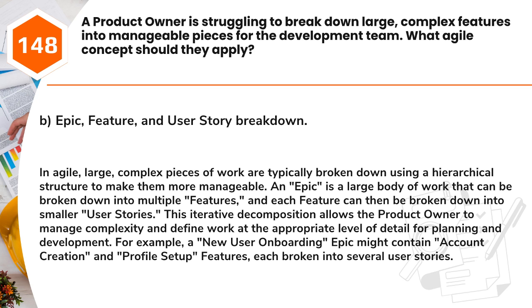This iterative decomposition allows the product owner to manage complexity and define work at the appropriate level of detail for planning and development. For example, a new user onboarding epic might contain account creation and profile setup features, each broken into several user stories.